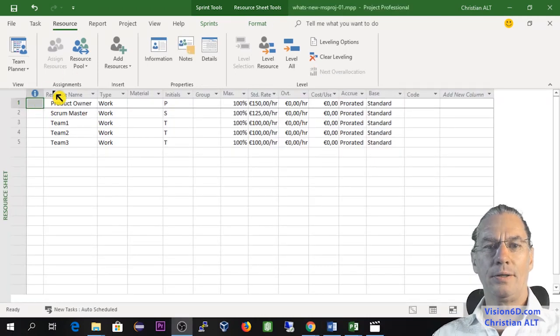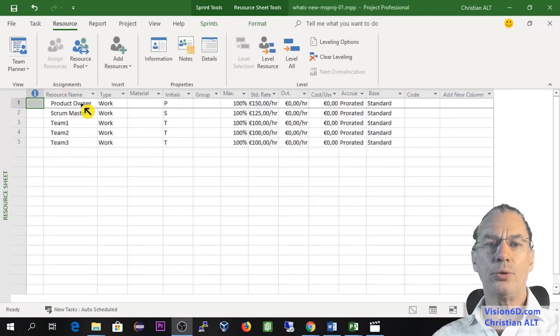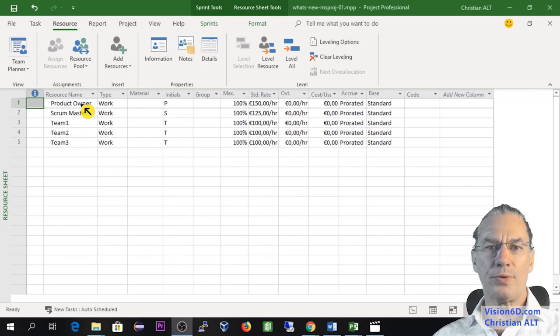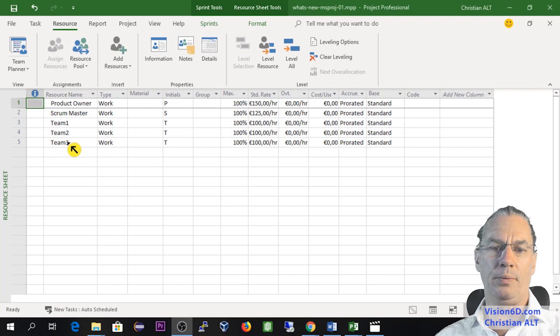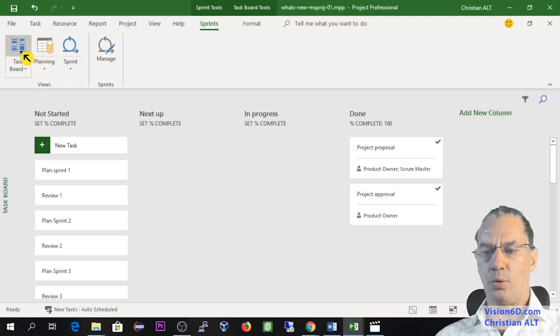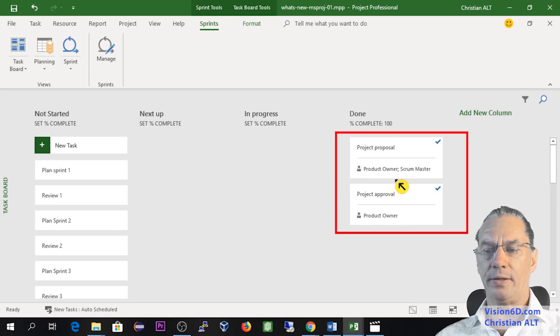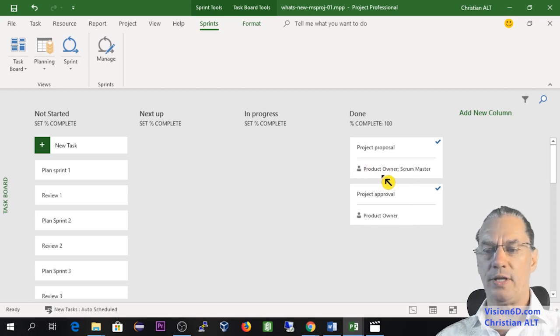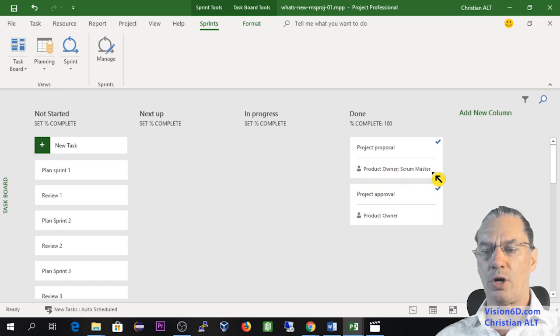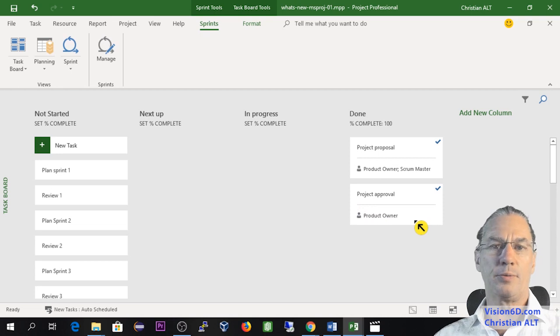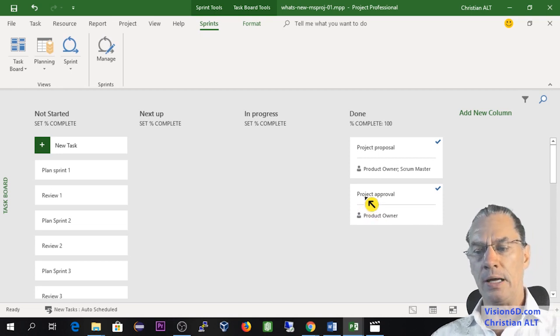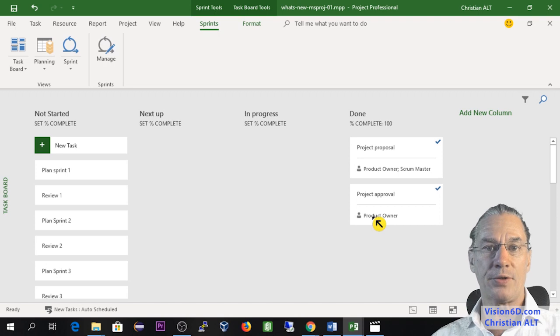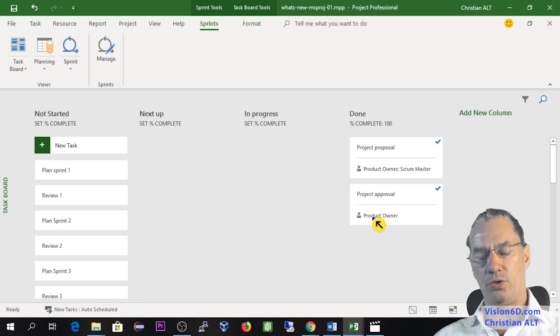Now we are in the resource sheet. And as you can see, I created some resources. I create the Product Owner, Scrum Master and Team Members 1, 2, 3. And to the task board, you see that the tasks that were done, I had added resources to them saying that the proposal is made by the Product Owner and the Scrum Master and Project Approval. It's the Product Owner, remembering you that Product Owner can be a customer or it can be somebody within your own organization.